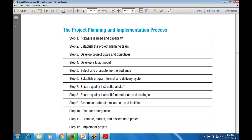Continuing the steps: step seven - ensure quality instruction staff; step eight - ensure quality instructional materials and strategies; step nine - assemble the questions, materials, resources, and facilities; step ten - plan for emergencies, preparing in advance; step eleven - promote, market, and disseminate the project; step twelve - implement the project.